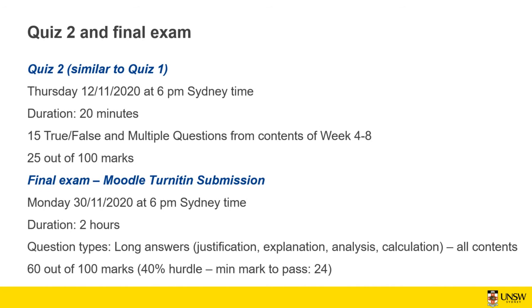But as I mentioned, this is the simplest version. There are other versions that, in the calculation of the ETC, also include the schedule performance index as well.